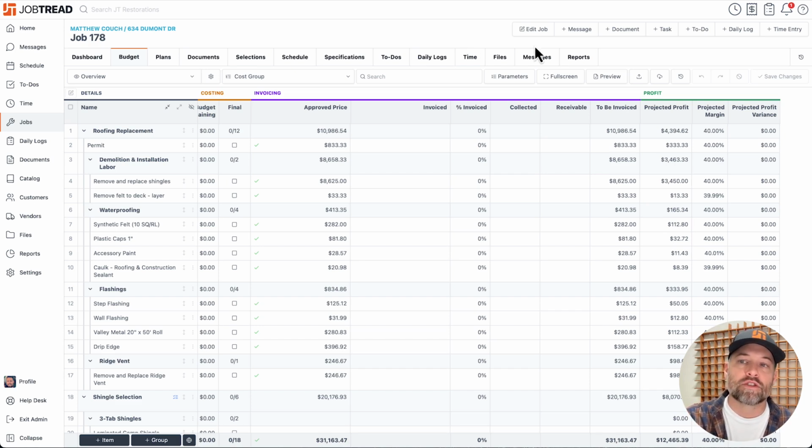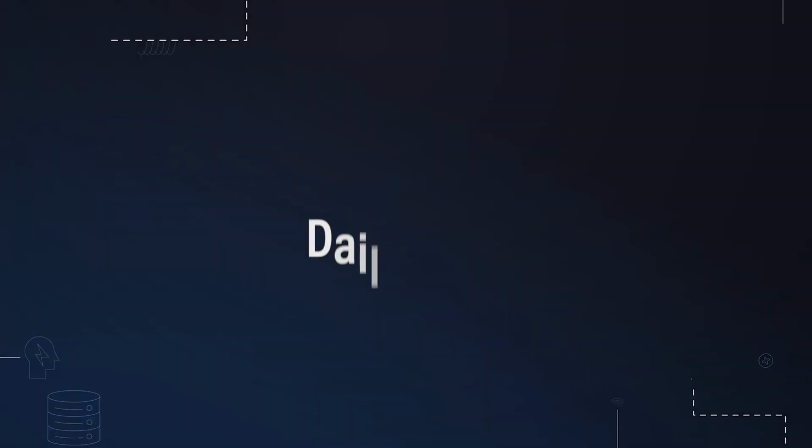In the very top right of the screen, you're going to see the time clock for your guys to clock in and clock out. The cool thing about that is it's automatically going to job cost for you as well. So as they clock into a job based off their hourly burn and rate, it's going to tell you the cost of their time so you can compare budget versus actuals. Also, we have the receipt entry system, so you can have the guys uploading their receipts that someone else within the office can categorize for them. And then we have the daily log function, which I do want to highlight.